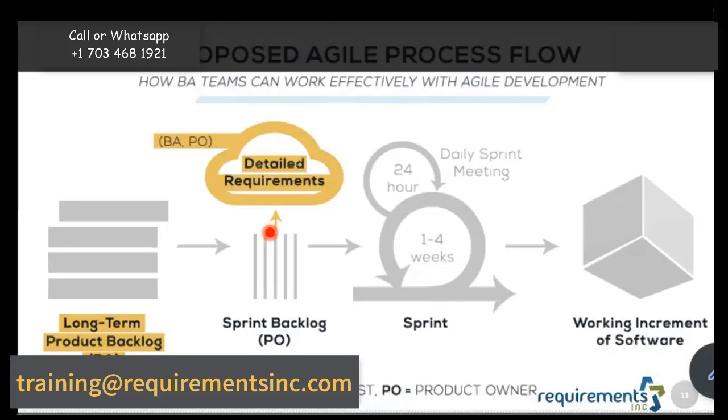So the very first sprint, you probably don't know how much you're going to deliver, so you'll kind of guess. By experience, you'll guess, okay, I guess we can try about 10 story points. I have a 2-week sprint, and I'm going to keep 1 day equal to 1 story point. So I have 10 working days. So I'll take 10 points and see where that leads us. And you do the same thing for the next sprint, and then you adjust.